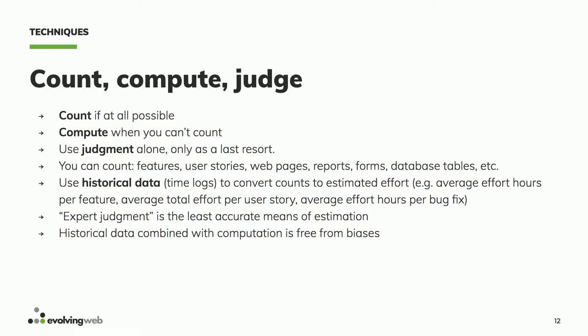We'll say, well, okay, how many lines of custom code do you have? Or I can ask them, okay, you want us to rebuild a Drupal 7 site onto Drupal 8, which is very common these days. How much of a budget and time did it take you guys to do it? Often they don't trust you, especially if they don't know you, so they won't tell you their budget or time. But you can ask them proxies for these things.